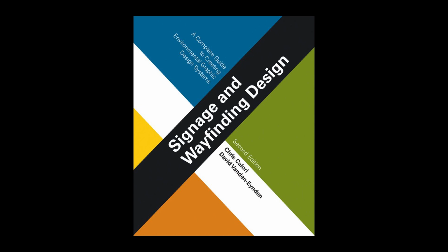Regardless of the level of detail or formality required, on one level or another, the technical specs for signage should cover at least the following: quality assurance, required submittals, quality/workmanship standards, materials and products, fabrication and graphic application techniques, installation and cleanup. Quality assurance specifies the qualifications fabricators must provide to assure they're capable of performing the work required by the design. This is very important on projects that go out to publicly advertised bidding.